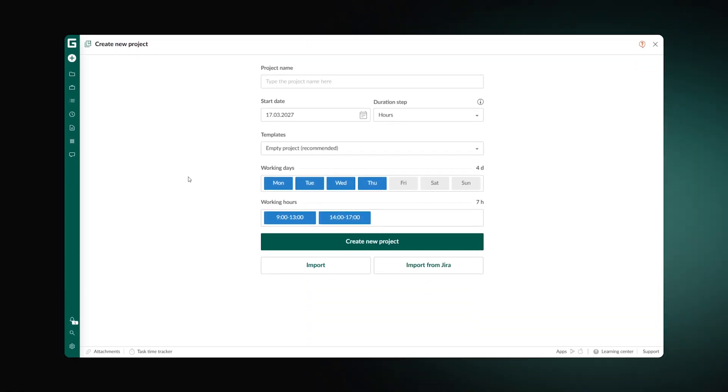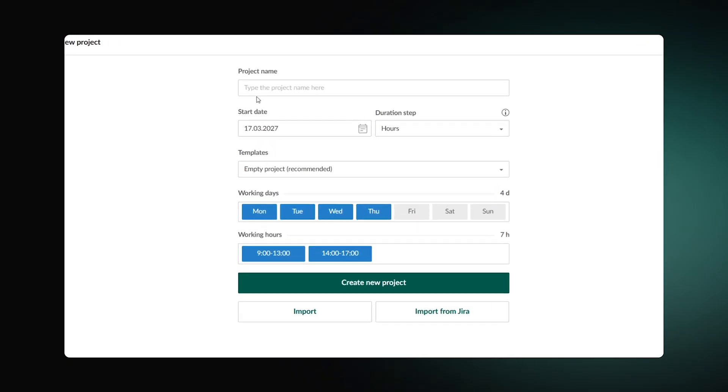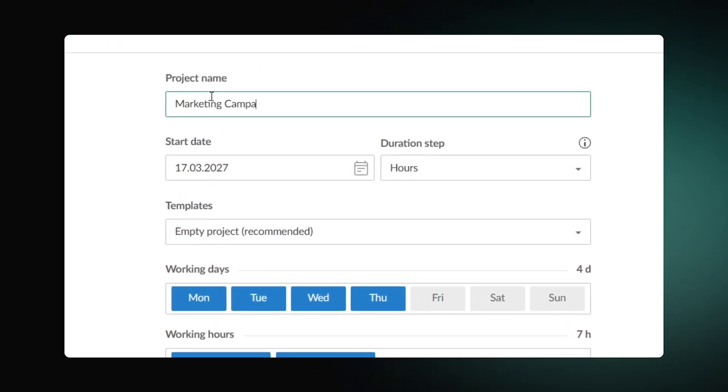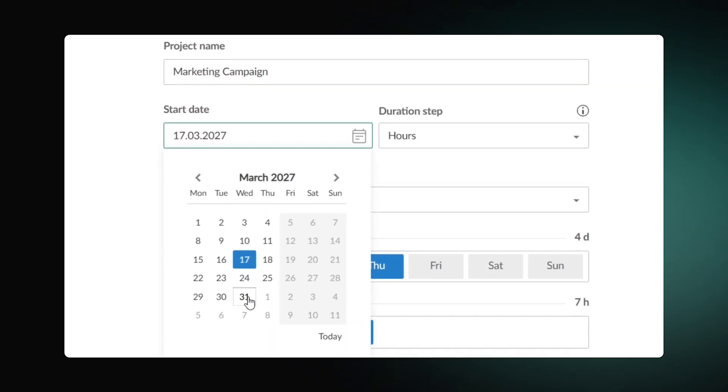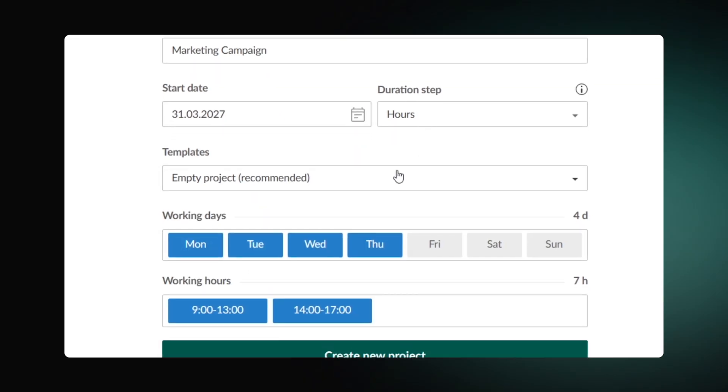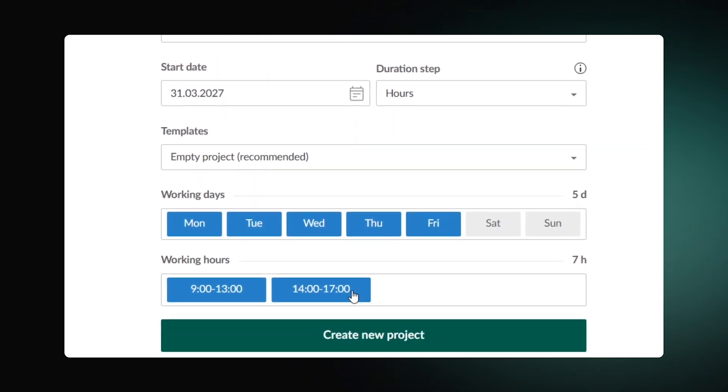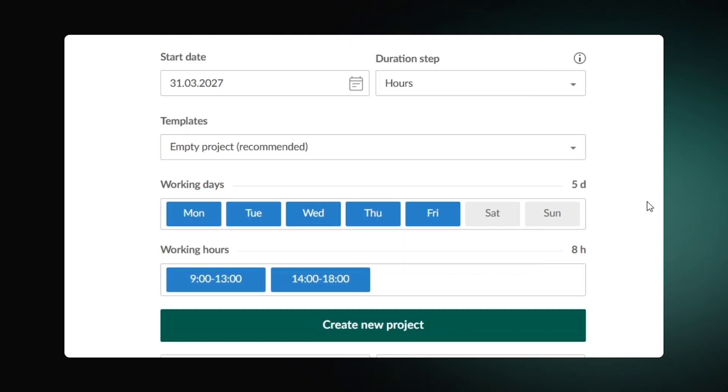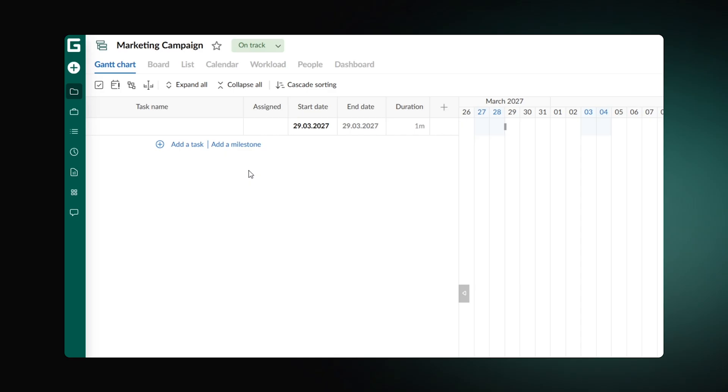Once you log in on GanttPro.com, you'll need to take a few steps. Firstly, set up your project. Introduce the title and the start date. Customize working days and hours and press Create a new project.